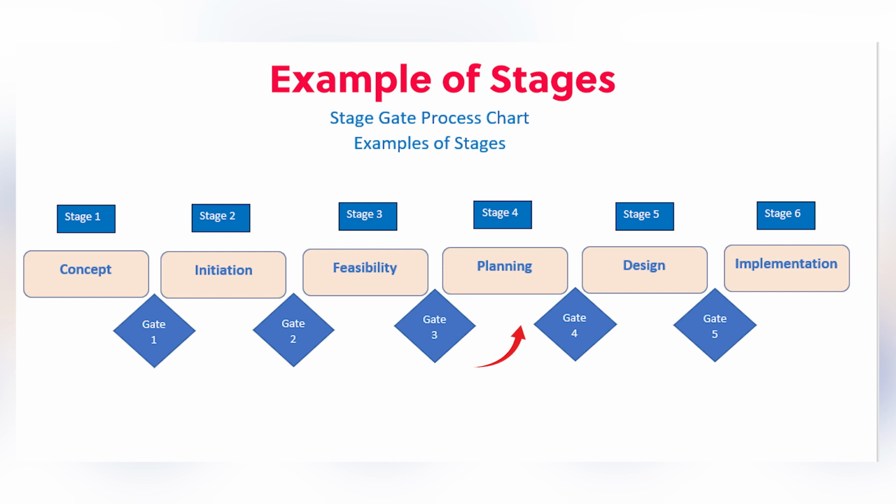So for the gate 4, your inputs would be something like a work breakdown structure or product breakdown structure, which is your scope document. A schedule, which defines some of the costs, your timelines and tasks and resources required. The initial risk register and your management plans. And these will all go in for review.